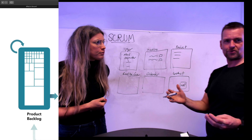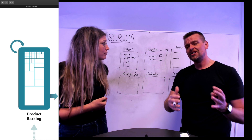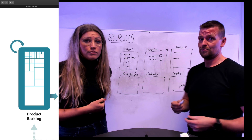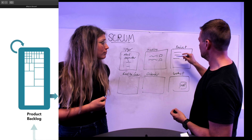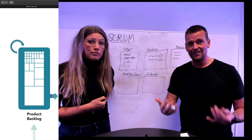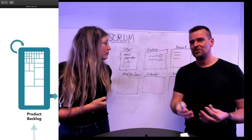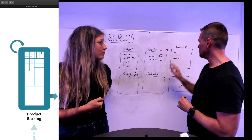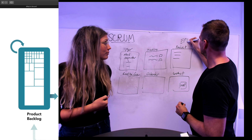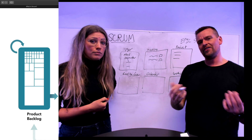So this is what we call epic stories. The customer just described a lot of features that are huge in reality — there's a lot of coding here for any team. For the product section alone, we talked about details, create, update, delete — a lot of things to manage data, plus customer-facing views. That's why we call it an epic story: it's a huge story we can split down later into smaller chunks to develop.